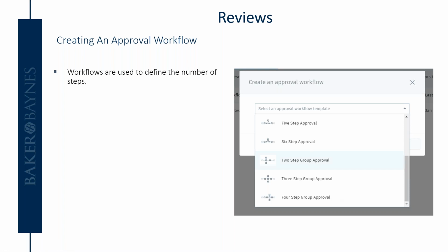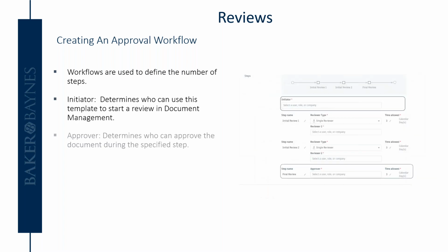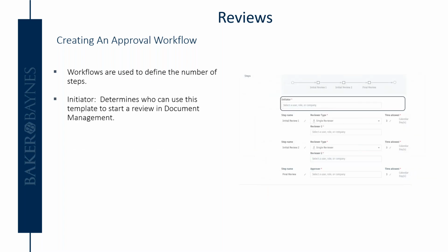That's probably a little bit of an overkill, although it's nice to see that it is there. But a lot of these approvals also tie into those information containers spoken about earlier. According to ISO 19650, the CDE needs to have a container, and from your work in progress to shared, it needs to go through an official review process.